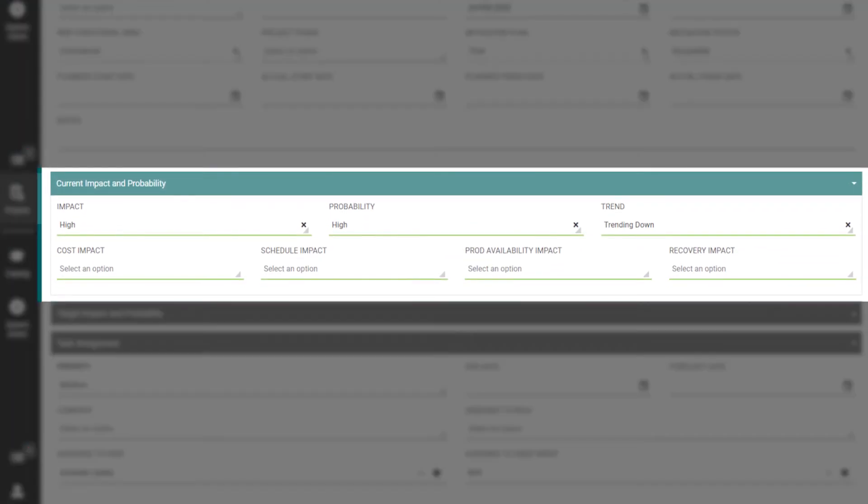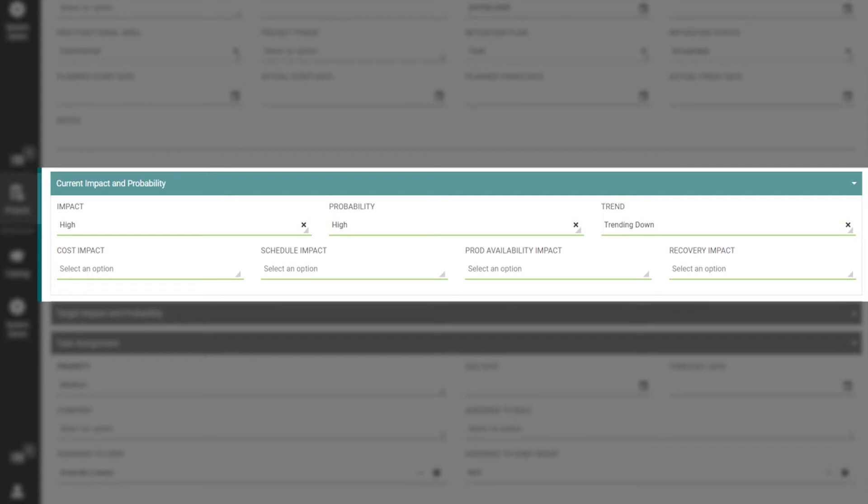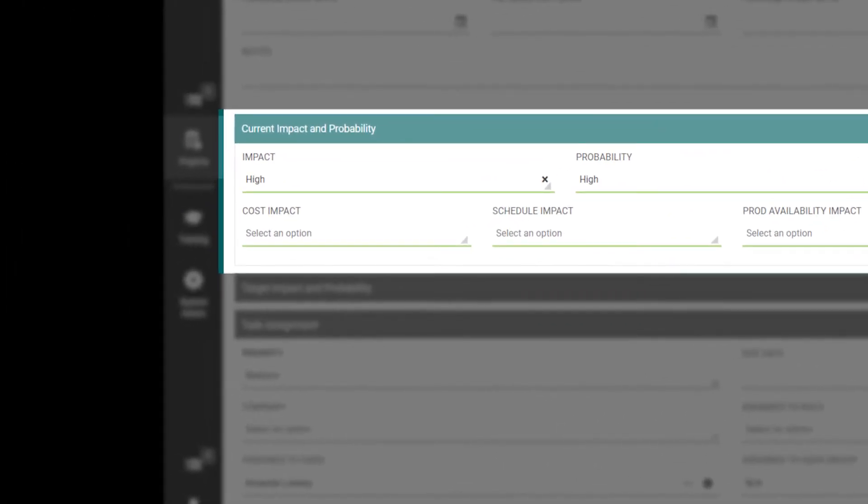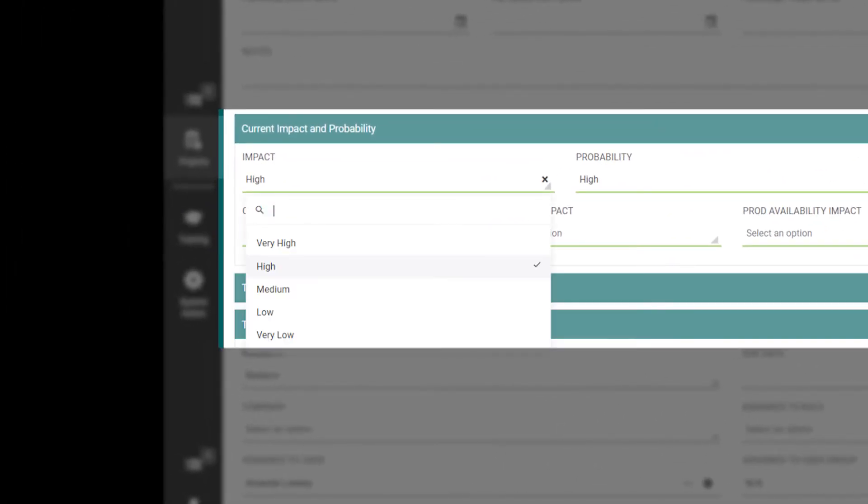Moving down the screen, you will see the Current Impact and Probability section. This is where you will see the level of impact this potential event has on the project, and how likely it is this event will occur. Both are ranked on a scale between very low and very high.